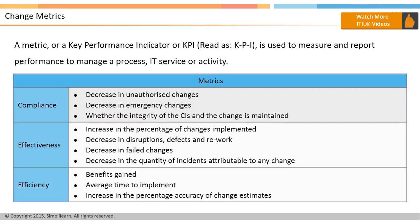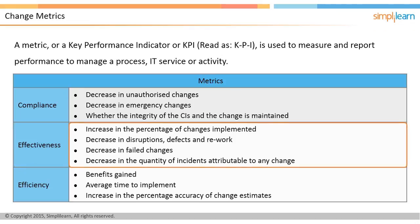For effectiveness in delivering value: increase in the percentage of changes implemented that meet customer requirements, increase in the percentage accuracy of change estimates, reduction in disruptions, defects, and rework, reduction in failed or backed out changes, and decrease in the quantity of incidents attributable to any change.